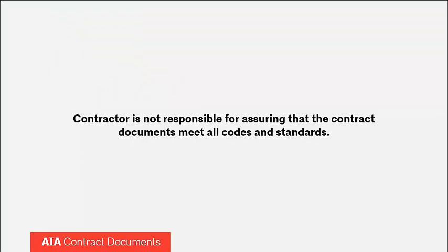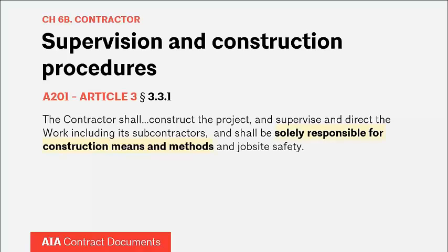Most importantly, the contractor is not responsible for assuring that the contract documents meet all codes and standards. That is the exclusive domain of the architect by virtue of our licensure.